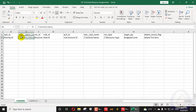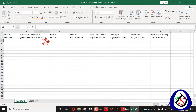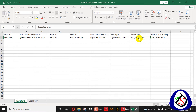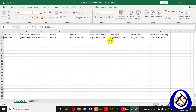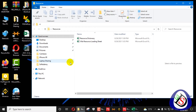The columns marked with a star don't require updating — they will not be changed even when importing back. We need to update Resource ID instead of Role ID, because we are assigning resources not roles. So the columns to fill are Resource ID, Activity ID, and Budgeted Units. Star-marked columns are not required.